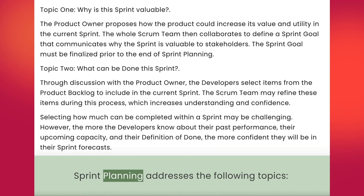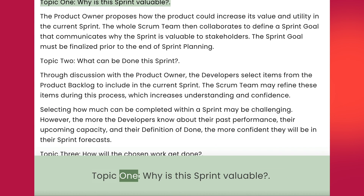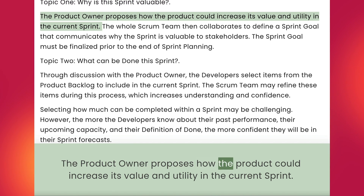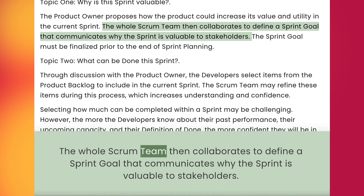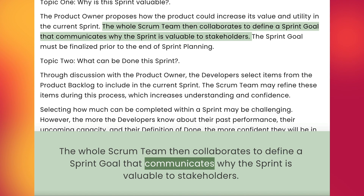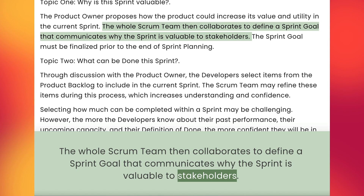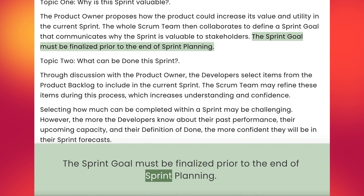Sprint planning addresses the following topics. Topic 1: Why is this sprint valuable? The product owner proposes how the product could increase its value and utility in the current sprint. The whole Scrum team then collaborates to define a sprint goal that communicates why the sprint is valuable to stakeholders. The sprint goal must be finalized prior to the end of sprint planning.